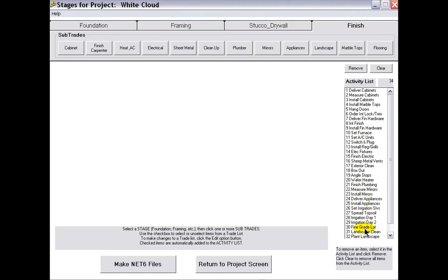The preloaded activities are easy to customize for each builder's preferred activity names. The preliminary list is not required to be set up in sequential order. A simple process shown here demonstrates how activities can be moved into a rough sequence, which will then be read into the network element of the DMS system. It will then be developed into a final project network.